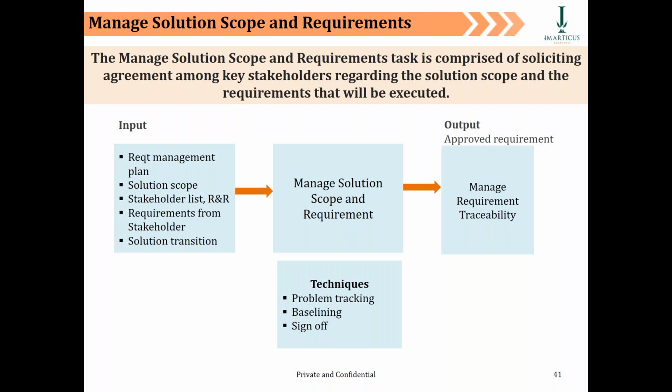But don't worry, because the client knows that unless we implement all the requirements, the whole of the overall solution will not look like the way it is. So 1,000 man days goes into baselining, all additional goes into add-on requirements, which becomes the additional solution scope. So core solution scope 1,000, additional solution scope 600, total scope 1,600 man days. So that is now the change which we are doing to the addendum and contract and giving back to the client.